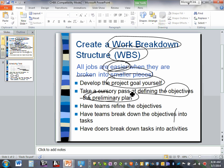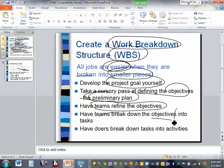Have a preliminary plan and let the team refine the objectives. A competent estimator might come back and say the task needs two weeks instead of one based on experience. A good manager will listen — maybe give a week and a half as a compromise. Allow the people to provide input, especially the competent ones. Have the team break objectives down into tasks, and have doers break tasks down into activities.